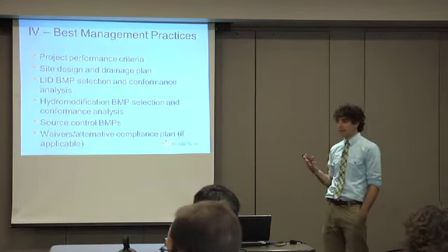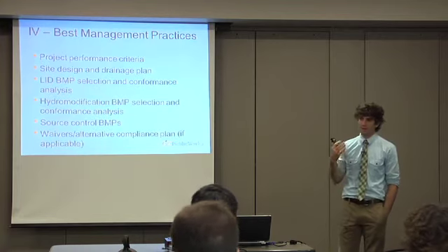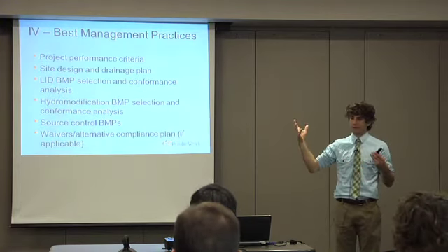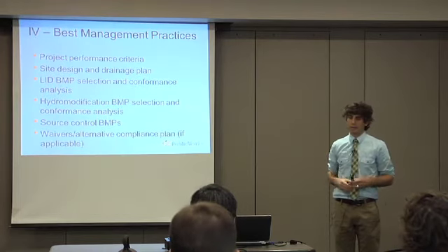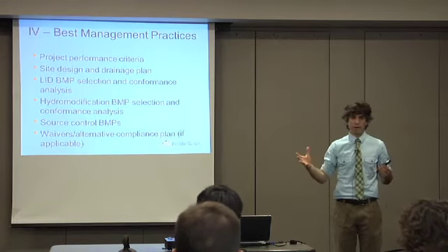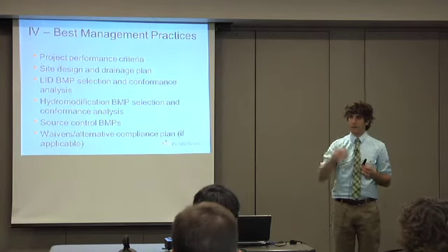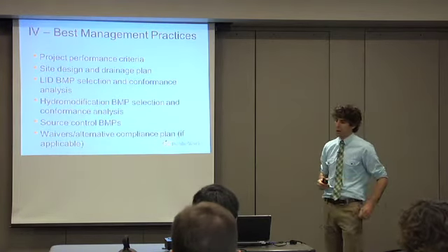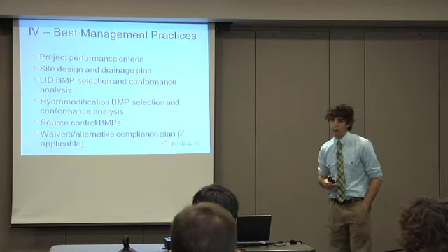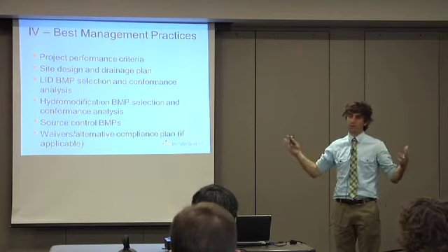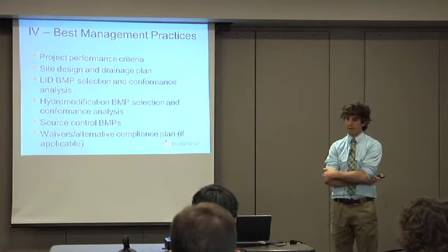So let's take the example of someone who's designed a BMP for hydromod control. It's sized to 4 acre-feet. They show that on their plans. They could even, and Remy will show us, the model will spit out an amount of water that's infiltrated as a result of that overall design. This is the amount of water that's infiltrated. That's what the HMP model predicts.